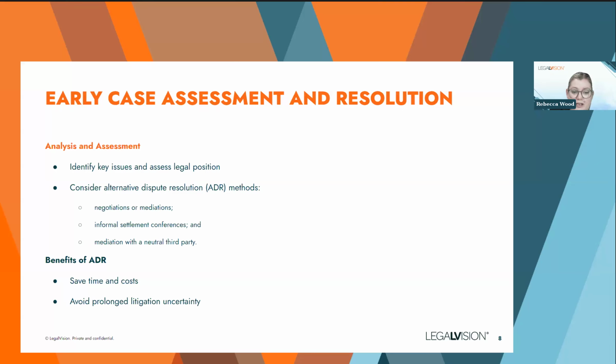So you can arrange a settlement conference where you can reach out to the parties on the other side of the dispute, in a without prejudice setting, to discuss their interests and try and work towards a settlement. On the other hand, if you think that the settlement discussions need to be facilitated by a neutral third party, you might want to consider arranging a more official mediation. In our experience, we find that often having a mediator acting kind of like an independent referee can really help push the parties to meet some common ground or compromise and resolve a dispute early.